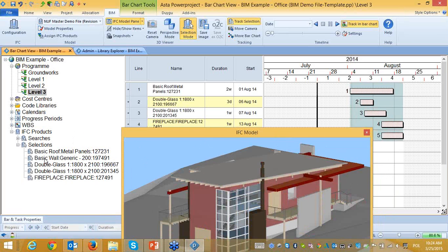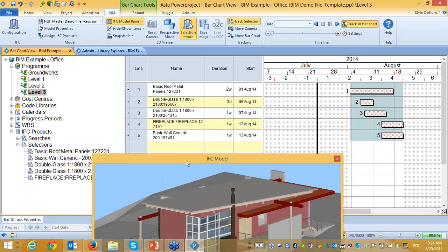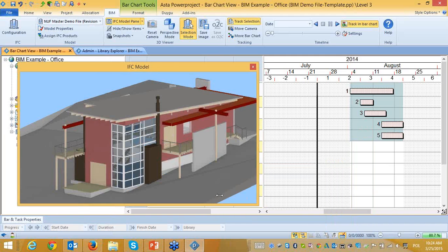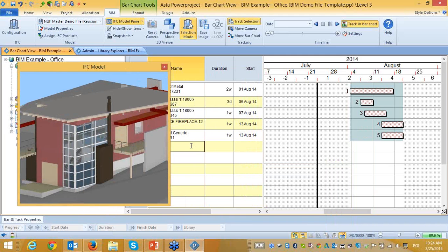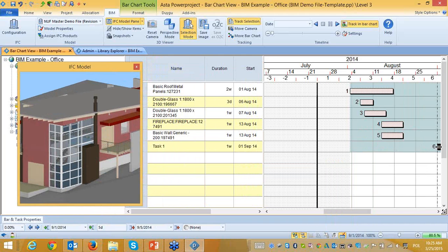So as you see here, we have 5 elements, and here also I have 5 activities. And there is another way, it's again manual, but you can do this time first creating the activity, let's say that is task 1. So I just manually write this, and I define the duration, let's say that it takes me 12 days. And now you can simply choose the activity, this one, let's say, and now I drop it on the task.